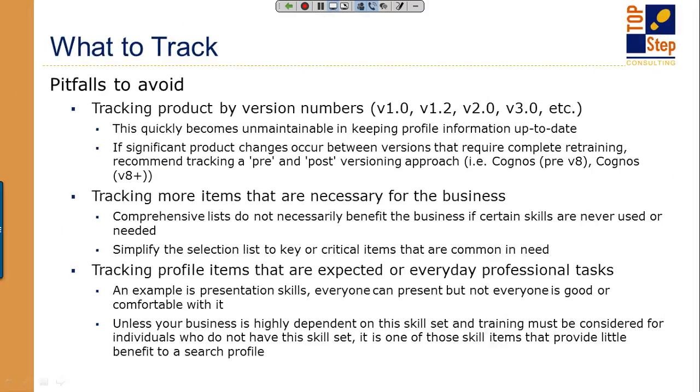Here is where I would start warning about using the skill profiles. And this is what we kind of talked about. The biggest problem with these, where this has failed, I'm going to say 99% of the time for people that have used it and have had it fail, but it might be 100%, frankly. The granularity level has to match your business need. And what I mean by that, most of the folks where this fails have gotten far too granular with their skill profiles.